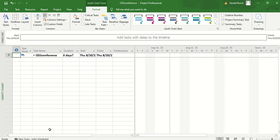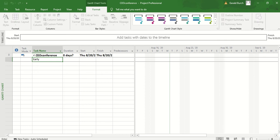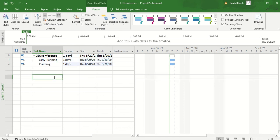Right now what we're going to do is we're just going to go in and we're going to add tasks. Please remember that everything in project is database driven and that the first database is your task and the second database is your resources. We're adding tasks right now. Under task name, we're just going to put in the two major headers which is early planning and the second one is planning. Those are our two major areas of planning.